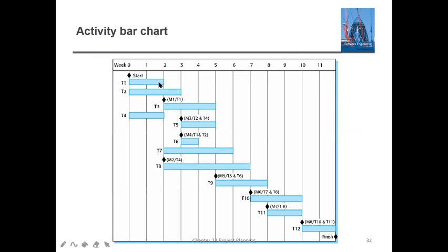If you have multiple horizontal bars occurring at the same time on your calendar, you have to treat that as concurrency and perform those tasks together. You can see the dependencies there. And the diamond shapes you are seeing are known as your milestones.